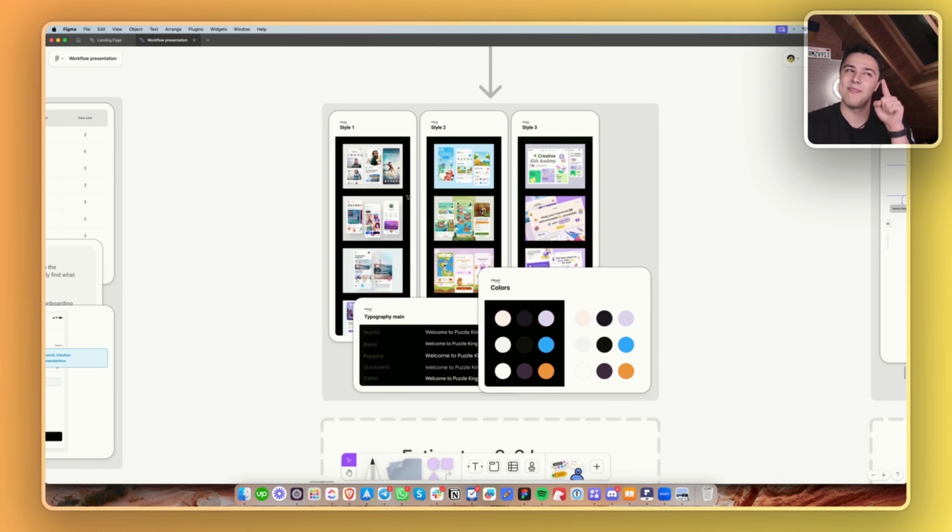And by this process we are avoiding issues like, oh, you made us a design but we don't like this design. You know what, we do know what you like and what you don't like because of the mood board, because you provided us a clear understanding of what is good and what is not for you, for your customer, and we are using that valuable information in the next steps. So the mood board is so important, because during that phase we can clearly understand what we expect from each other and avoid any possible issues about taste and any other useless stuff.